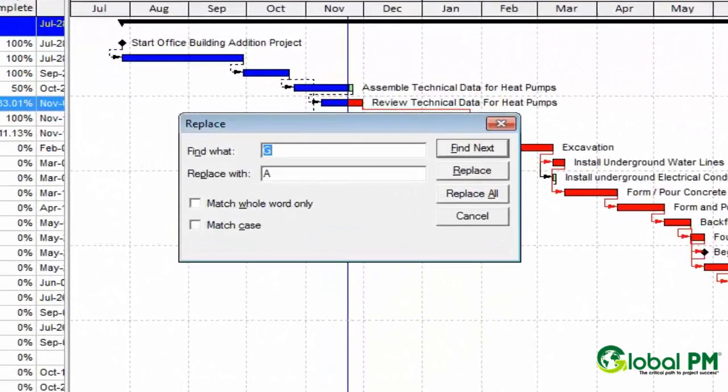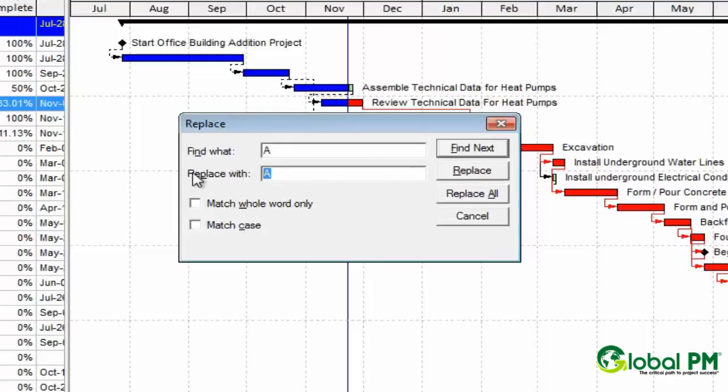So hit Control R, find A and replace with, and what I'm going to do here is just delete the A that I had in that place and leave it blank.